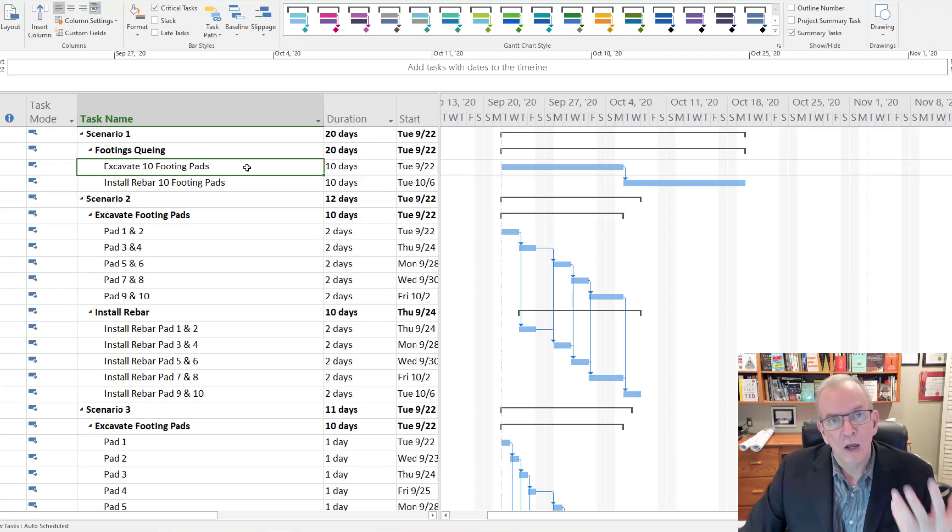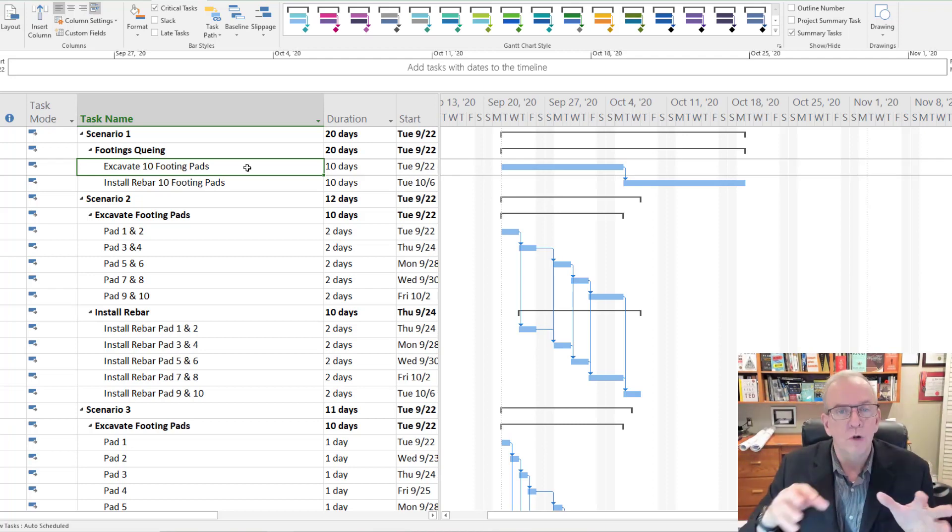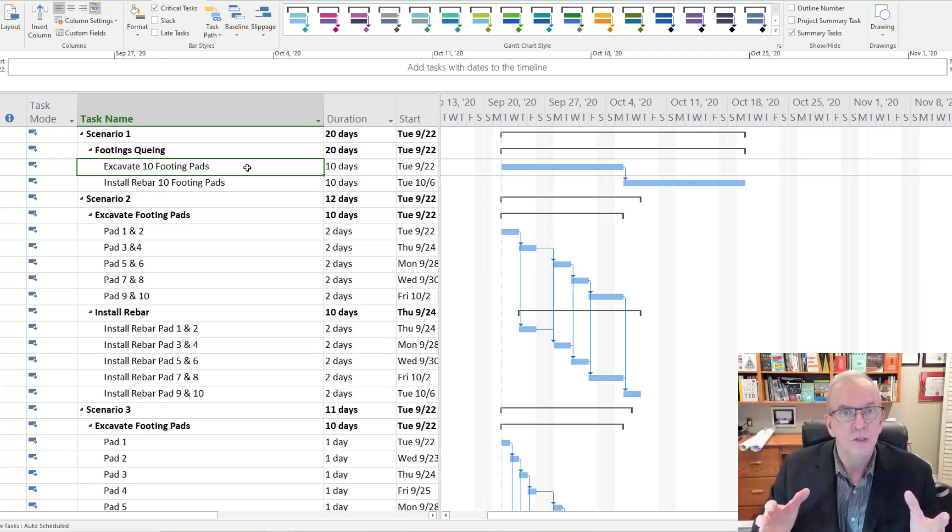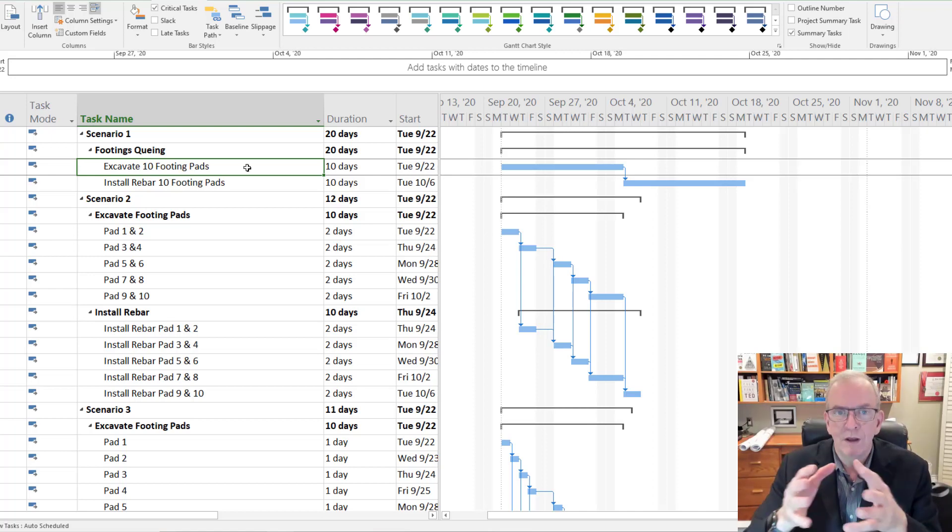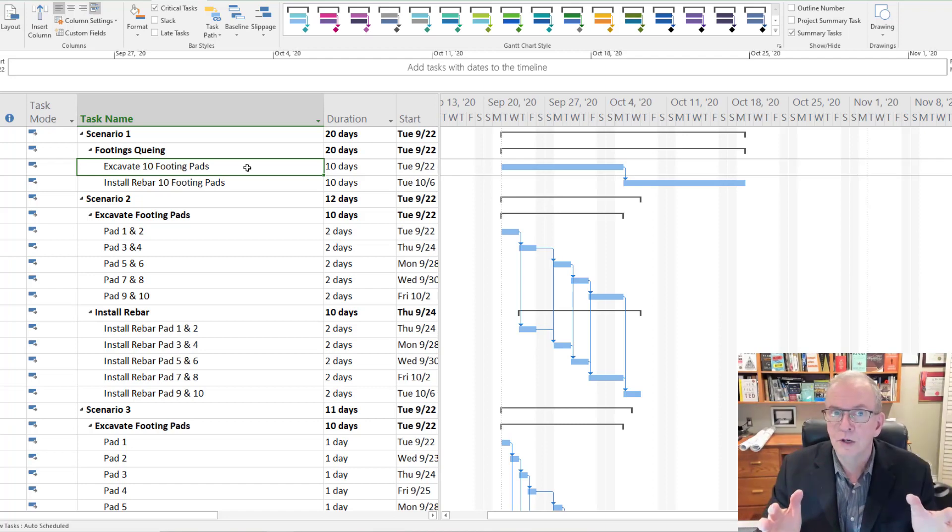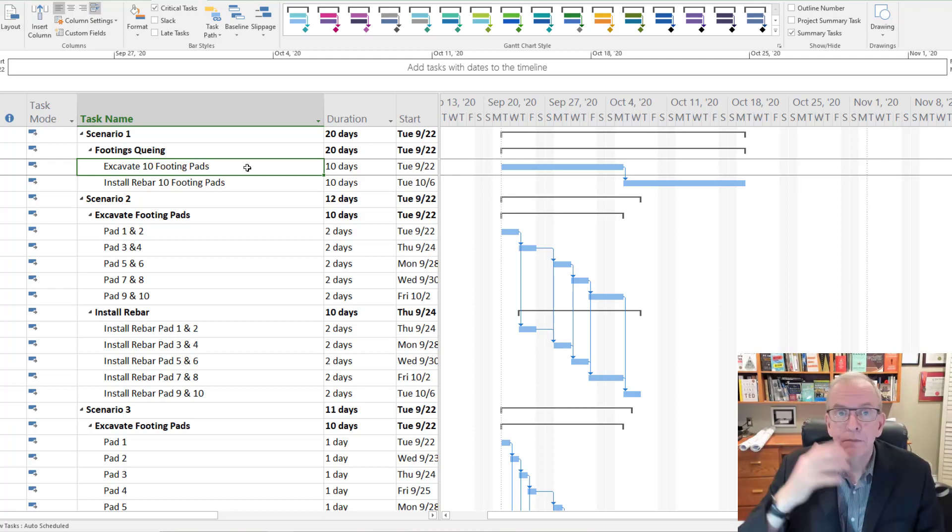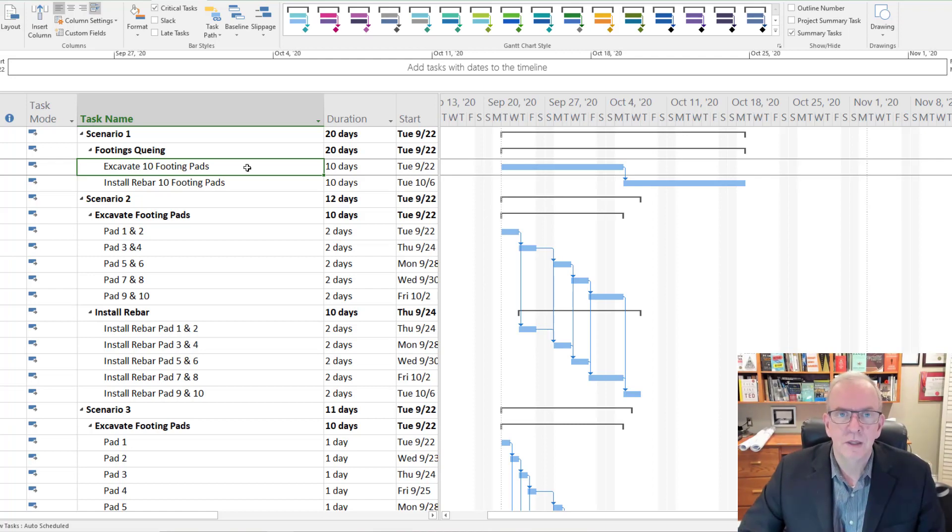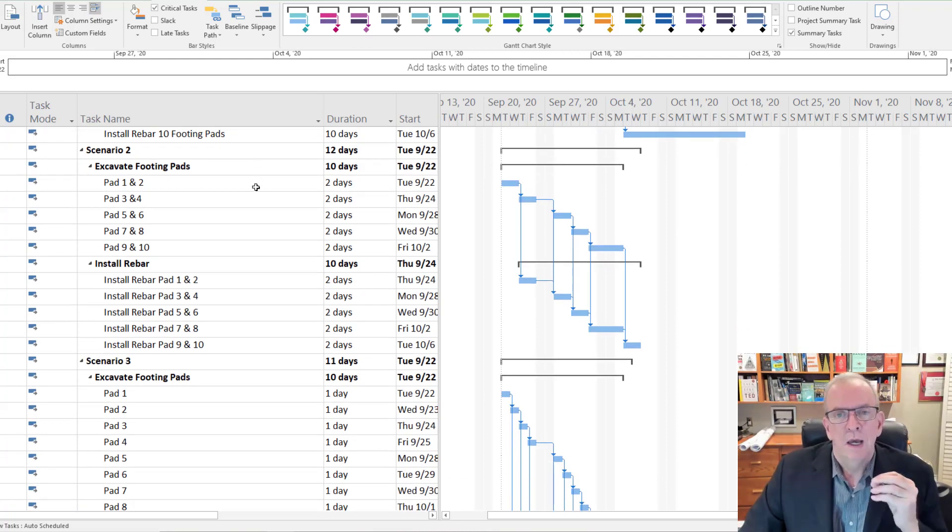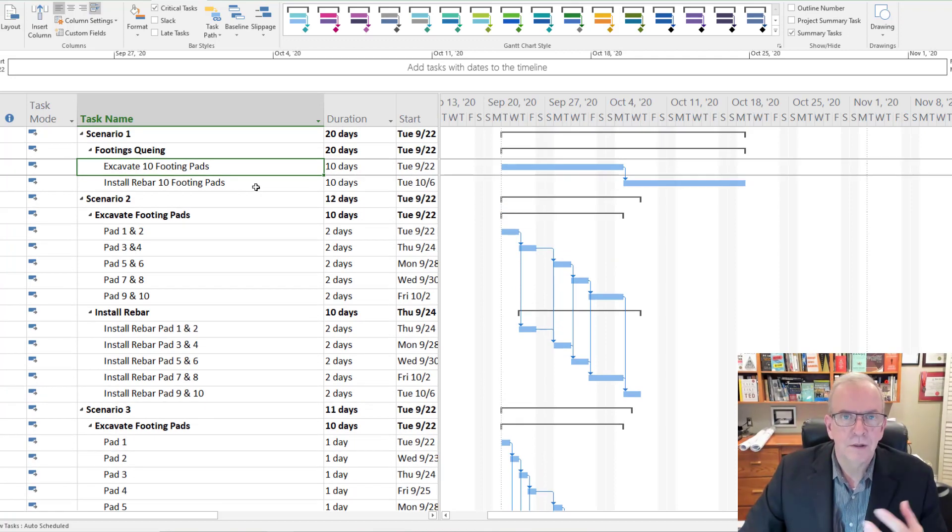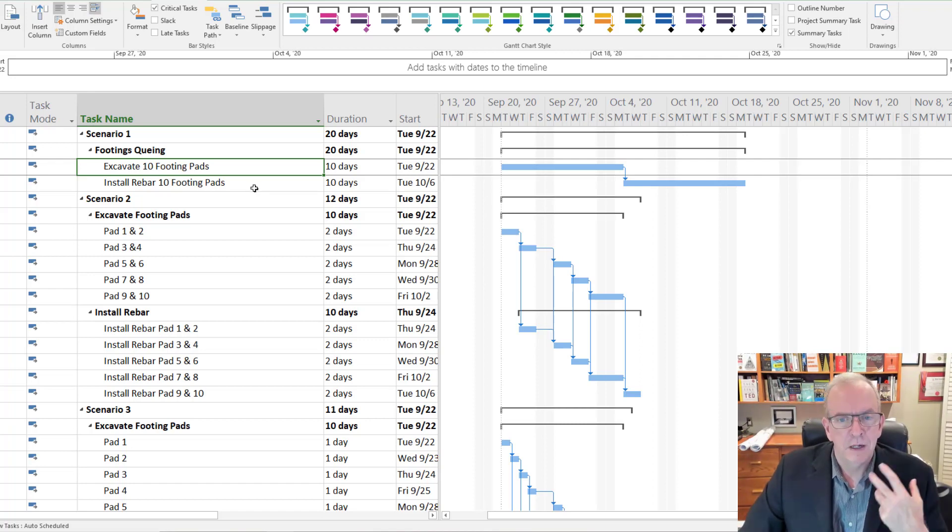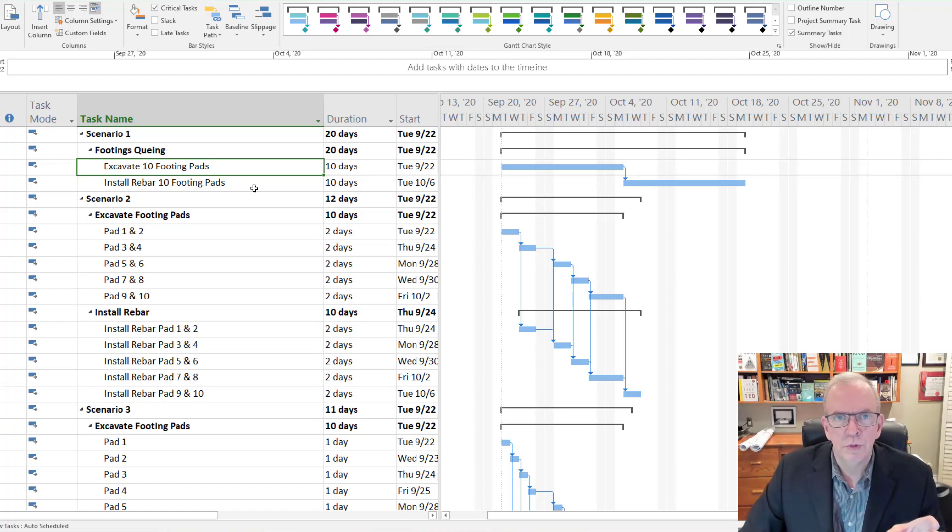And if you do it well, this is where LPS, last planner system in lean construction works really well. You've set up a system where there's really good communication going on. You're developing this plan from a milestone date, from a make ready state. Milestone might be three or four months, make ready a six week look ahead, weekly and daily feedbacks. This is going to be really good because the feedback is going to be very quick. The learning is going to be very quick. That's something we don't see in traditional construction methodologies that we definitely see when we're using this kind of thought patterns. That's why tact is becoming very popular. That's why last planner system is becoming very popular.